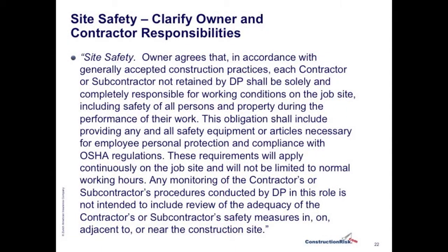I'm going to put up a clause that I think is useful in clarifying the owner's and contractor's responsibilities. And so you could borrow this type of language to insert into a contract when you see that it is putting too much responsibility onto the design firm. This clause reads as follows, quote, "Owner agrees that in accordance with generally accepted construction practices, each contractor or subcontractor not retained by the design professional shall be solely and completely responsible for working conditions on the job site, including safety of all persons and property during the performance of their work.